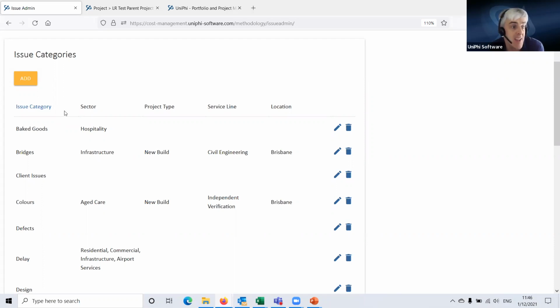If you are being assessed, so you're being audited, and you have your project plan that says, here is how I will manage my project, your headings from that might want to reflect your issues. And when someone says, well, show me how you're doing RFIs, you go, great, issue system, filter for RFIs. Here are all the open RFIs. Here are the closed ones. Here are the actions for people we're waiting on. It's all here and it's all live.